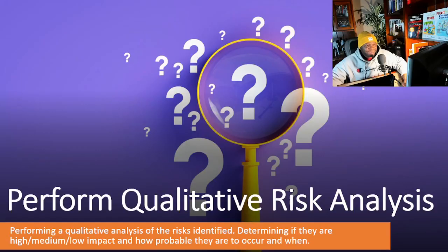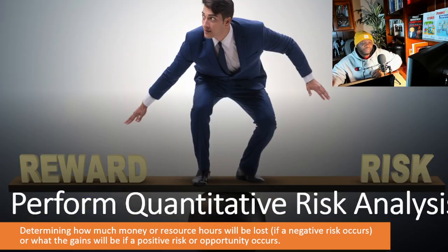All right. I hope you're following along. Let's move on to the next process, which we have actually talked about, and that is performing a quantitative risk analysis. So again, the probability in percent, the impact in dollars. You multiply both, you get an EMV, expected monetary value. Okay.